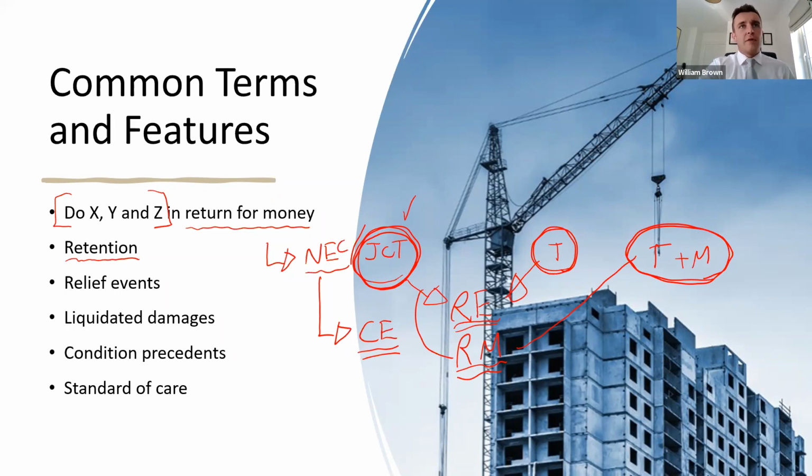There's another question there from Luke. Would a change order be treated as a relief event or just an amendment to the original contract? Well, it's both. A change order is effectively an amendment to the original contract. Normally, it would be an amendment to the employer's requirements. And your use of the word change order, I'm assuming that you're working in the Republic of Ireland, because that's the terminology used under the Public Works.